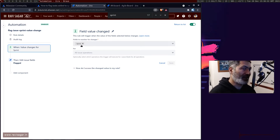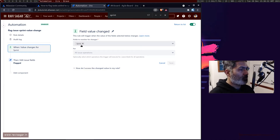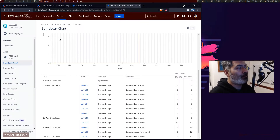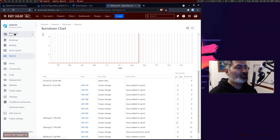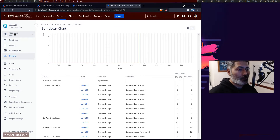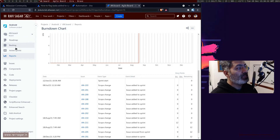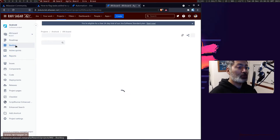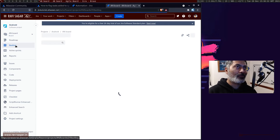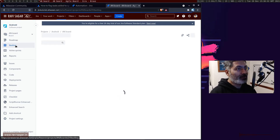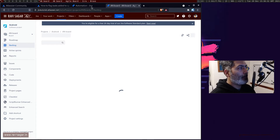The rule is triggered when the field value changes — specifically the sprint field — because when you add an issue to a sprint, the sprint field is updated in Jira. Based on the sprint field, you can see on the issue itself which sprint that particular issue is in. This is quite useful.